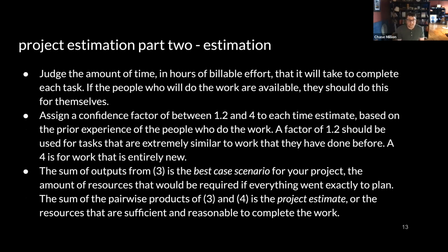So now onto the estimation. You have a work breakdown structure that is all of the tasks, such that if all of the tasks are completed, your requirements will be met and your project will be completed successfully. For each of those tasks, go through them one by one. For each of them, make an estimate in terms of billable hours, that is the number of hours you'll actually spend doing the work, of what it will take you to complete each task.